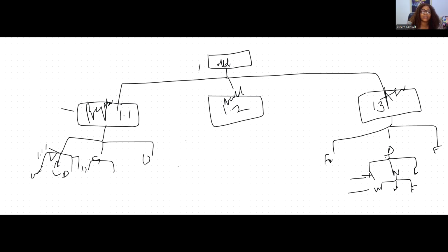How do we create it? We now start talking about the activities to create the food. So at this point, we are stopping at just work packages. When we come in tomorrow, we'll look at what activities we need to do for us to be able to bring in drinks. Who are our vendors? Are they supplying it to us? Are we going to pick it up? If we are going to pick it up, how many hours will it take for us to bring it in? If they are going to deliver it, how long will it take them to bring it in? So you now start looking at those activities that are needed for you to complete each work package.